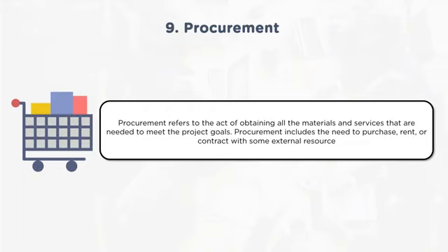While doing this, one has to understand what type of contracting they need to enter into. Basically, we speak of three types of contracts. One is the cost plus contract, where cost is fully known to the project manager and to the organization. Apart from the known cost, a fee will be paid to the supplier.